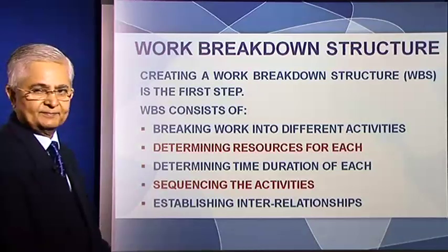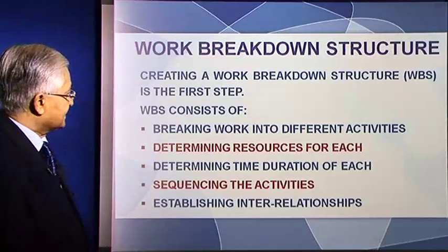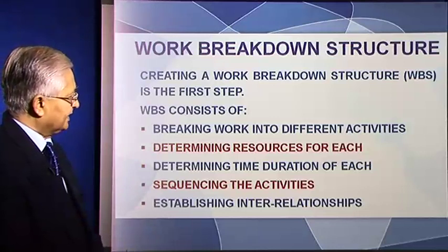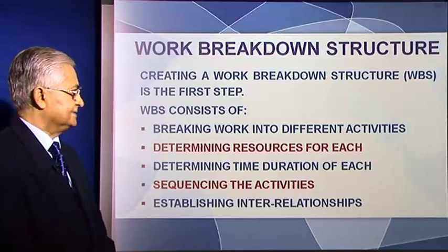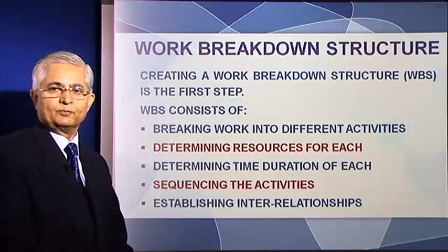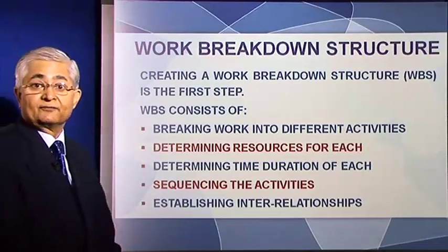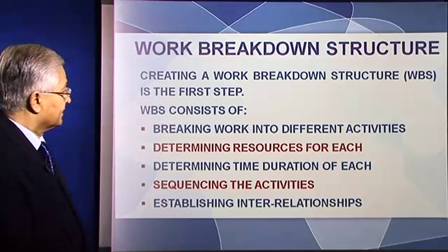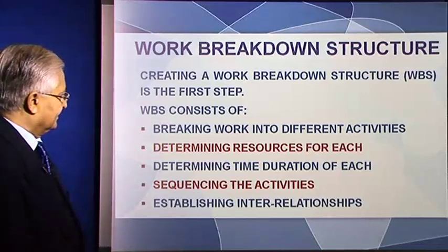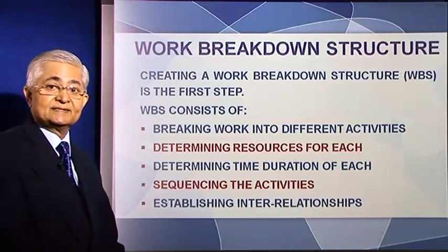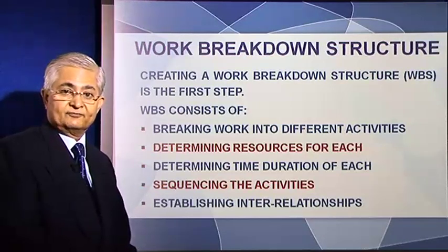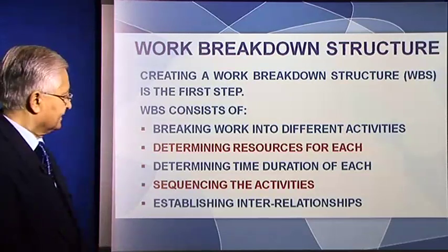That's step one. Now, step two is, for each activity, we determine the resource that would be required. This is an estimate of the resource that would be required. Third, we estimate the time that will be required for that activity.